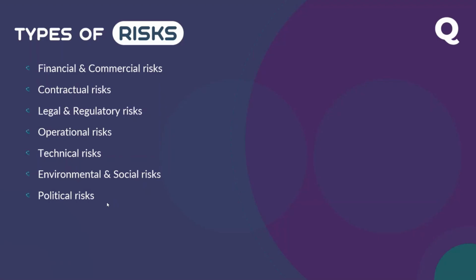And you will have a document control system. I don't want you to unilaterally control the document control system. I also want to see access. I also want to see the editing and the deleting processes. So you have to make sure, because now, after Corona, everything is through e-channels. Documents are very few. So if a document management system, say Aconex or Unifier, is operated unilaterally by the client, he can do anything on that. So you have to ensure that's not the case. That risk you have to cover.